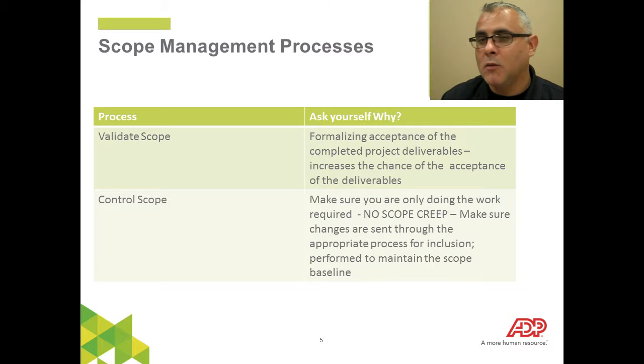I am going to tell you one term that you'll probably find in some of your practice quizzes. It's called gold plating. Gold plating is something similar to scope creep, but gold plating is really when part of the development team says, you know what, I think the client will ultimately like this. It's a real easy update. Let me go ahead and put this in, and it costs no money, no additional resources or materials. Let's just go ahead and put that in. That is bad.